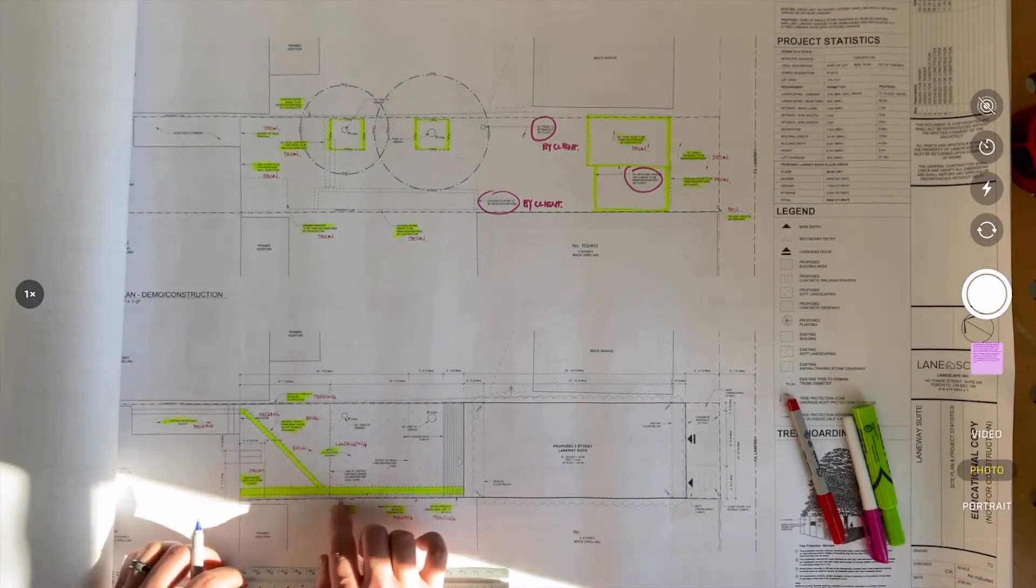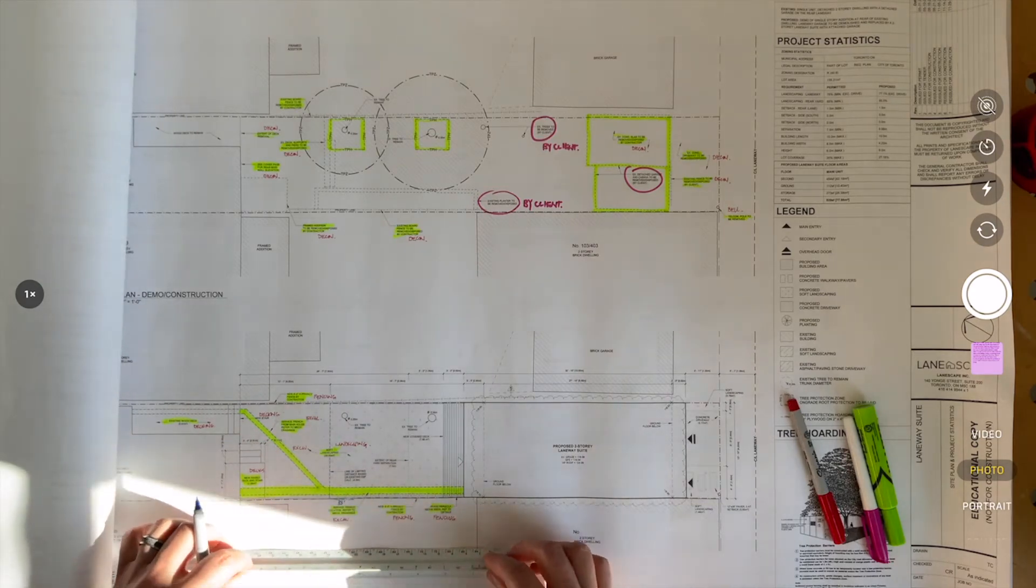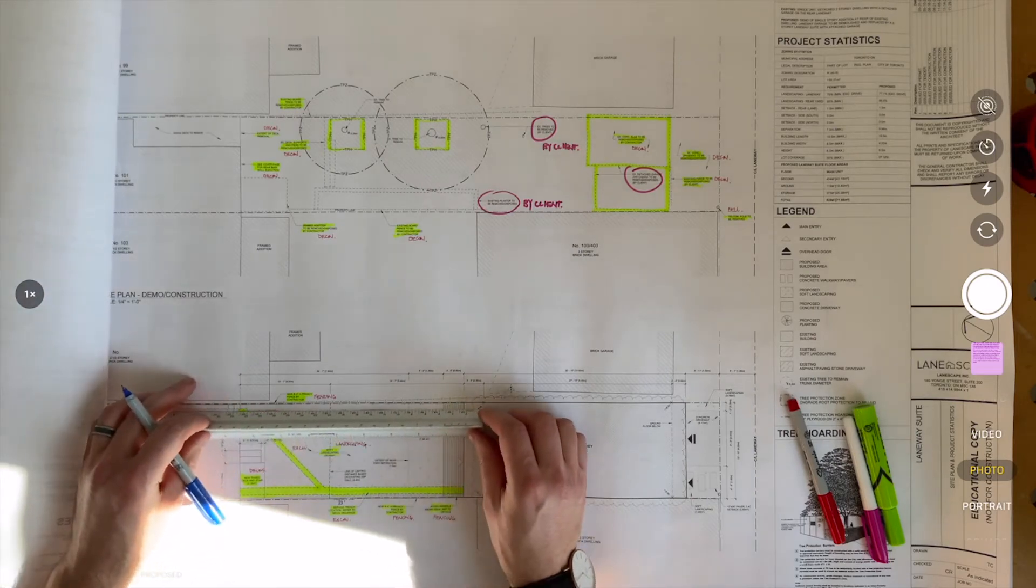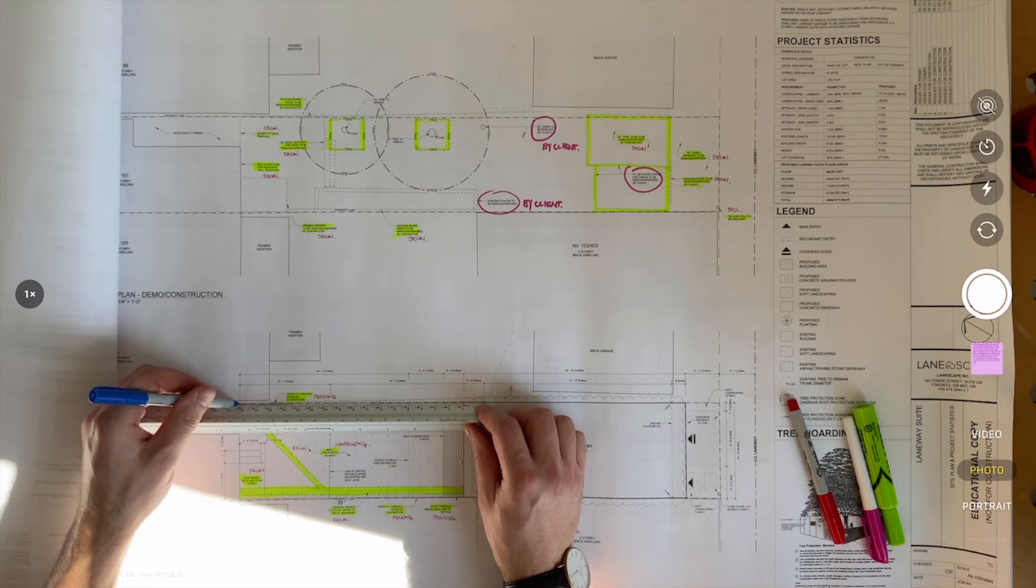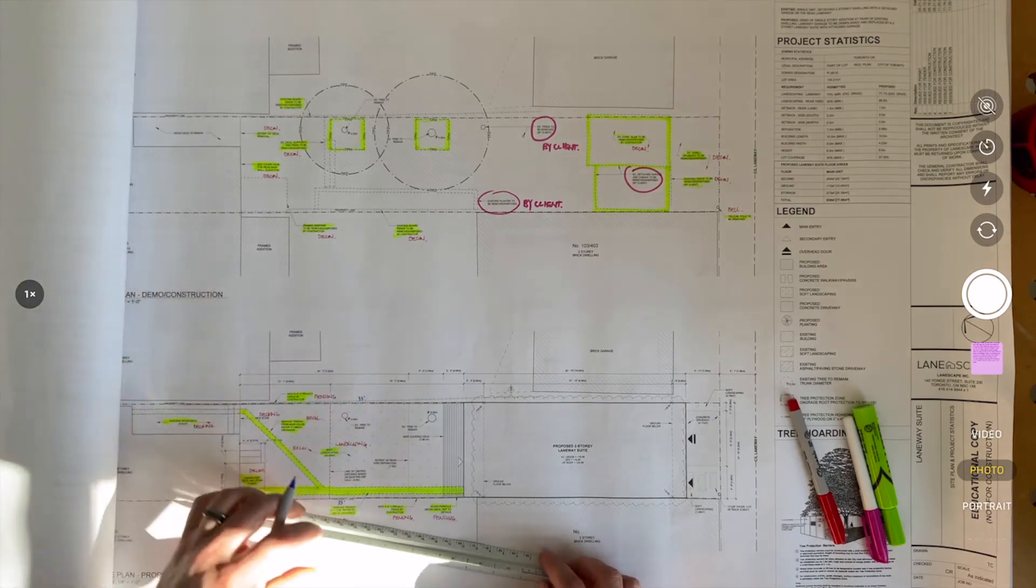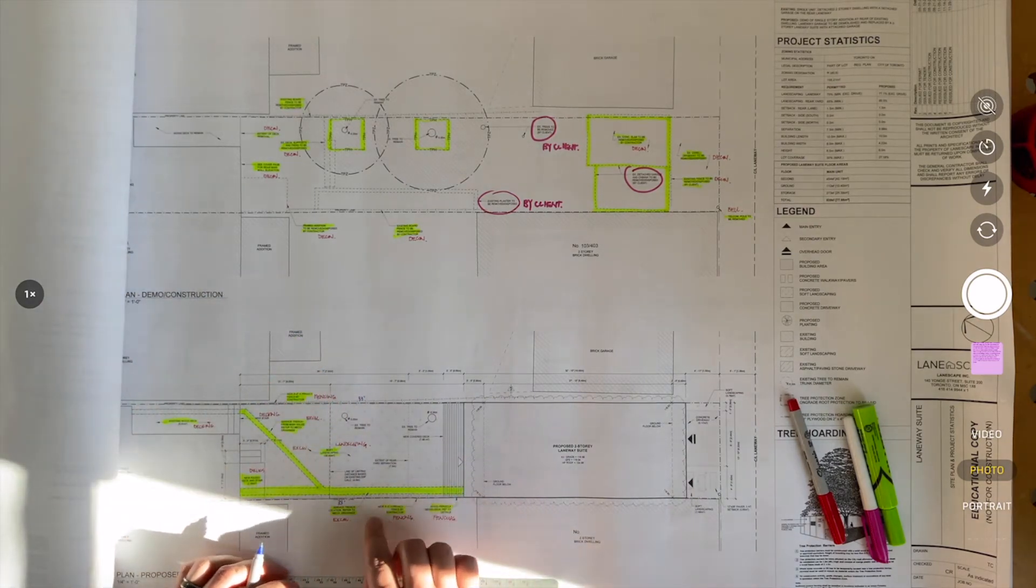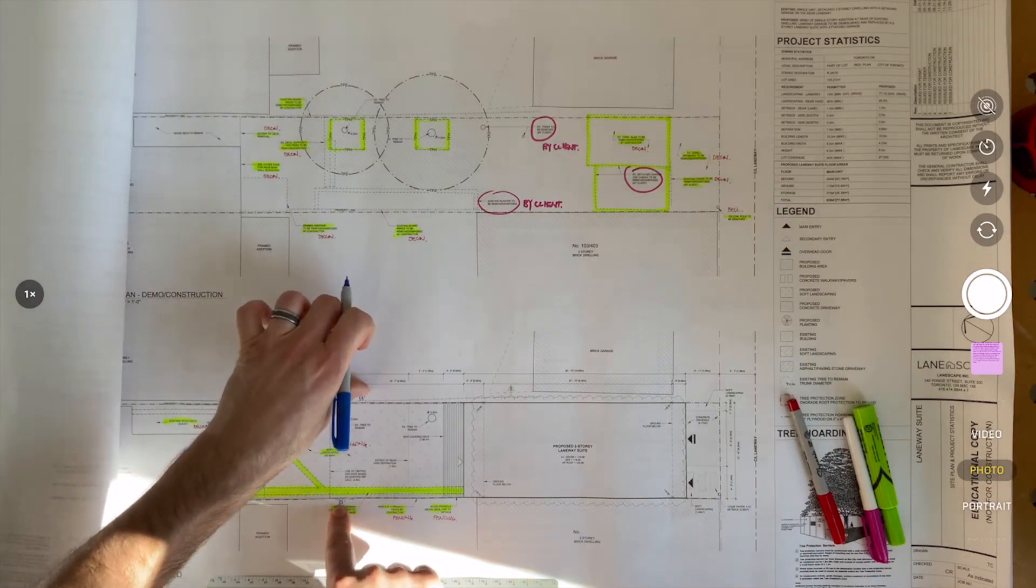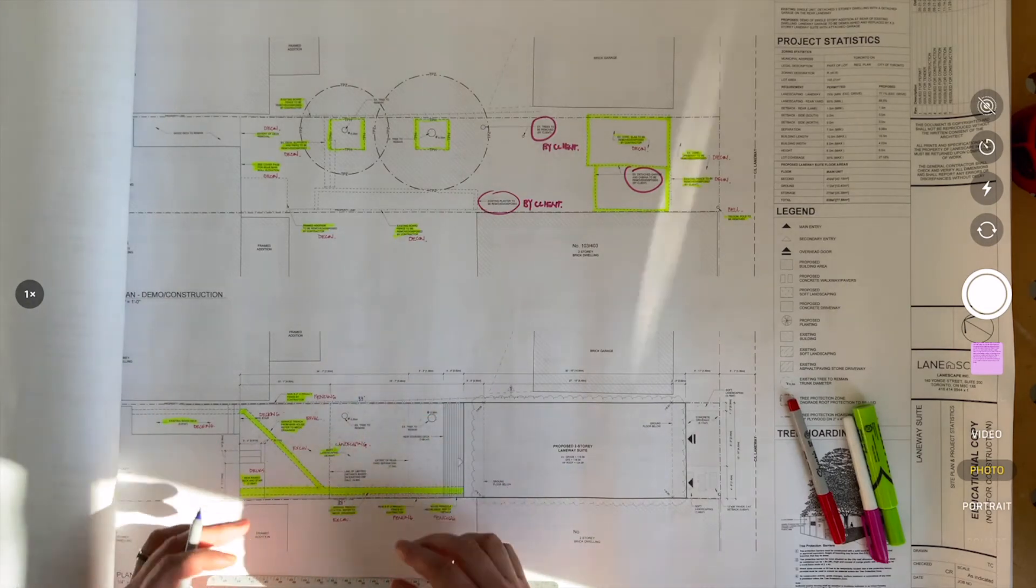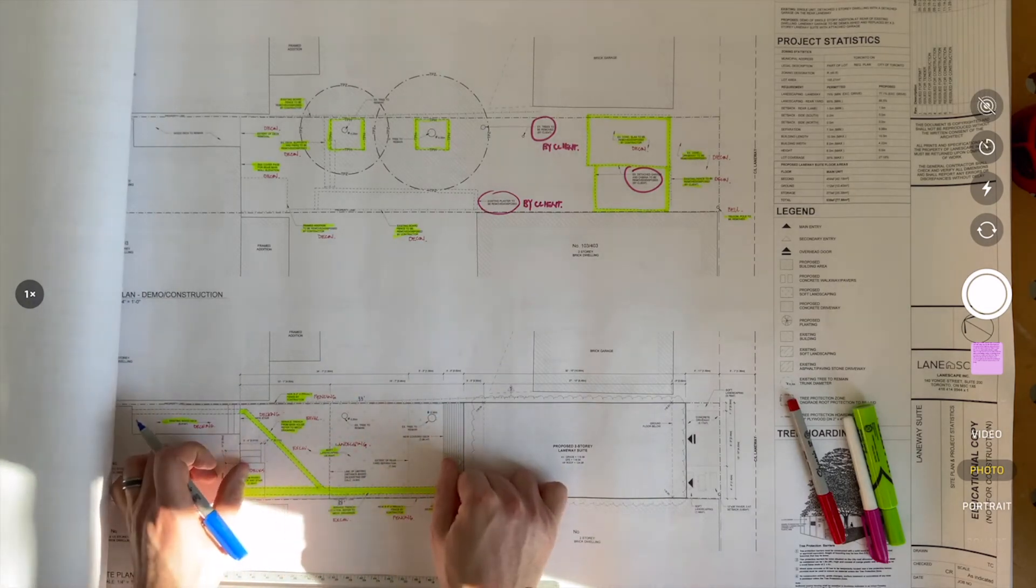I can mark 33 feet. I write it perpendicular, sort of parallel to the line, so I know what I've dimensioned. If I want to measure on this side, again it goes from this point until this point. I mark on the zero, come across, and I get 33 feet. So same dimension – 33. So when I get to fencing, I'll check this note off and say, okay, I need 66 linear feet of new fencing and that'll break down for materials. I'll go around my entire property and look at what are my takeoffs for even things like soft landscaping.